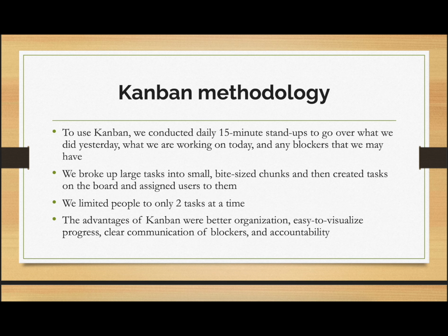And for the Kanban methodology, to implement this, we just had small 15-minute stand-ups every day to go over three things: what we did yesterday, what we're doing today, and any blockers that we might have, and how we can resolve those blockers. We used the JIRA ideology of epics, with smaller things underneath the epics as issues. We took big tasks and broke them up into small bite-sized chunks, and then created tasks on the board and assigned users to them.